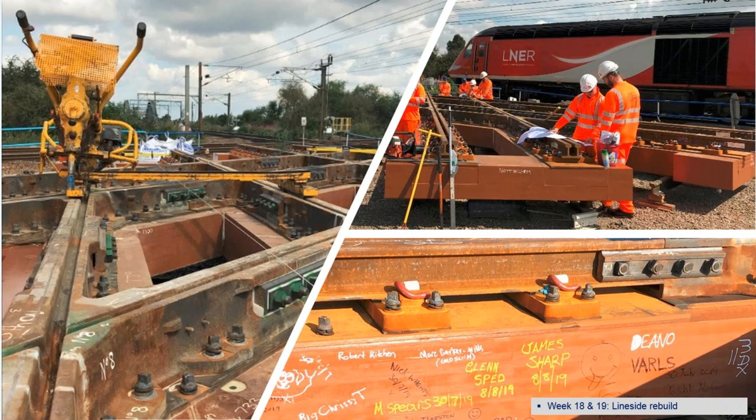IP, a bigger organisation looking at the actual risks for this, were not really happy with that situation, so they were getting a little bit excited that the product acceptance certificate hadn't been received probably 3 or 4 weeks ahead of the 2 weeks I'd stated. But unfortunately, there was no way this was going to happen, because the build wasn't going to be on site until around the third week before the installation. So there was a bit of a problem with IP wanting to get that assessed and making sure there was no risk that the layout wouldn't be ready. But I couldn't give that guarantee, because I had to make sure those joints were as built as required, in the right format, and with no problems. So it was a bit of a friction moment between IP and ourselves.